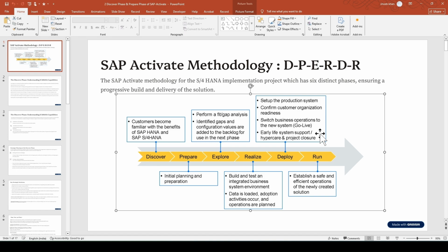They upload all the real-time data or master data, as well as developments. All the data is tested there from a functional as well as a technical perspective. Once the data is uploaded, all the cutover activity is performed there. So this is cutover activity, mock-up rehearsals. Master data is uploaded, as well as the balances.